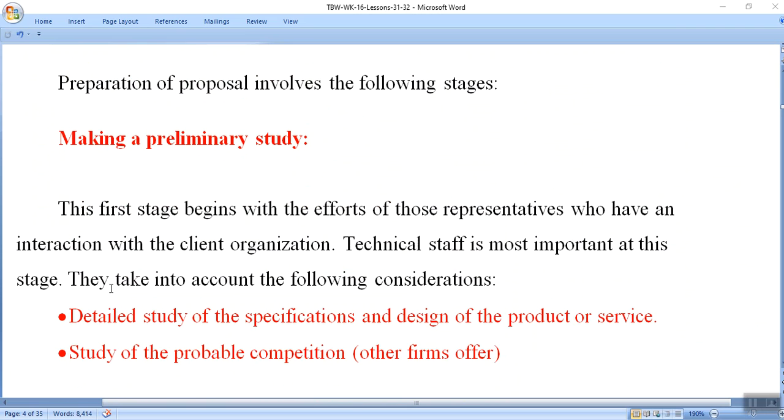Making a preliminary study, a basic study. Basic study means that the very first thing is that whatever correspondence or bid offer has been given by the government or a company, their correspondence on emails, letters, and any kind of presentations, everything has to be collected and presented in the meeting. First, the legal team analyzes whether the project they are going to make is legal or illegal, whether the company making a private project is perfect or not.